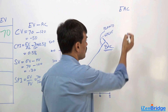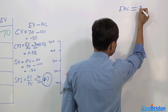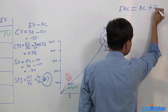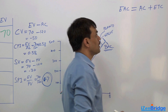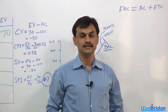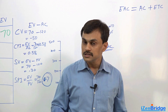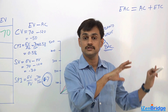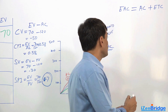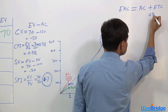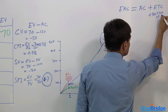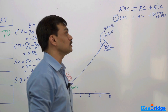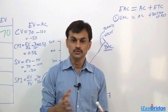In a simple case, you know that you have already spent something — 120 dollars is already gone. That is actual cost. And how much are you going to spend for the remaining work? That is called estimate to complete. There could be a first case where you realize that whatever estimate we did was useless. All the assumptions we made were useless and we can't use our previous estimate to figure out the trend for future estimates — we need to do it again. That means you do a complete new bottom-up estimate for the remaining work, and that becomes your new estimate at completion.